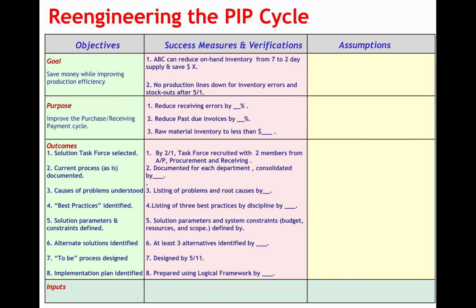Now let's pick up a few of the key assumptions. To go from inputs, the action plan, into the outcomes, things like the team members are willing to participate, that you have data available that captures the problems and gives you the root causes. Other Oracle sites are providing correct information, and so forth. The reason for identifying assumptions: this is first of all a jumping off point to more extensive risk analysis and mitigation. But more importantly, we want to see if there's any deal breakers, any things that we really can't work around, and discover that early rather than spending a lot of resources and finding it halfway through.